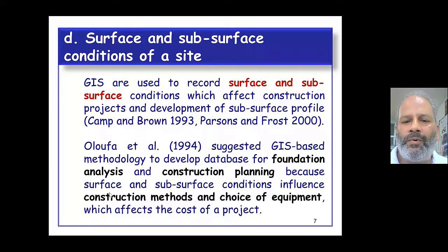So there are a few studies reported in which they have used borehole data, and that borehole data is used to generate surface profile also. And sometimes, depending upon that profile, we are in a position to decide what construction method is to be used, and which type of equipment is to be used to carry out that construction.